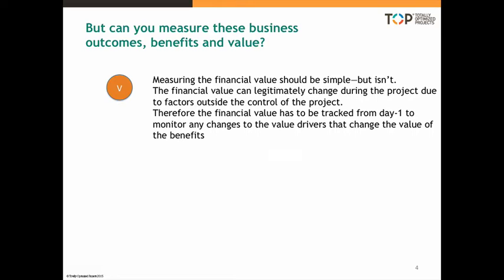If your benefit value is dependent on exchange rates or interest rates or salary rates or the number of applications from the market or any of those sort of criteria, then they can change during the project. Totally outside the control of the project, but they will impact the value of the benefits. And therefore the financial value has to be tracked from day one to monitor any changes to the value drivers that change the value of the benefits.